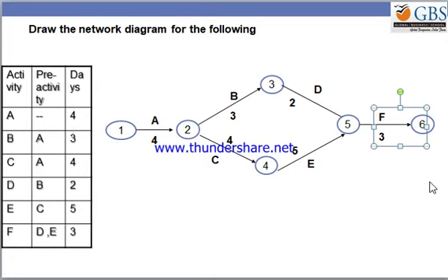B required 3 days after A completion. C required 4 days to complete only after A. So I had drawn B and C. Once B and C are completed, we can definitely go to D and E. D will be done only after completion of the B activity.